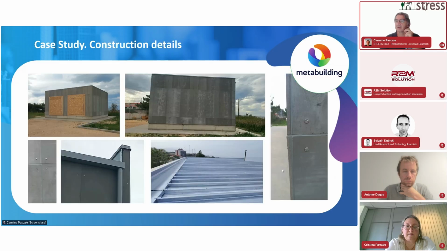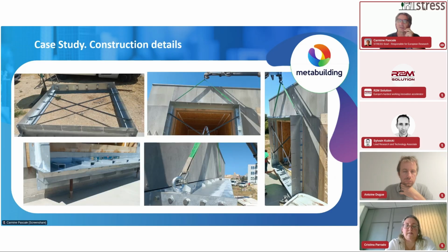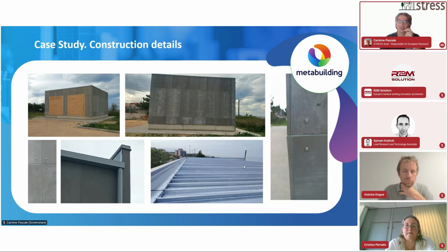Obviously, also in our case, we had to take into account some local modifications, because we are exposed to very salty conditions and very strong winds. So we had to modify the roof. And after we completed the original roof, we had to add another roof, a different roof with different components.